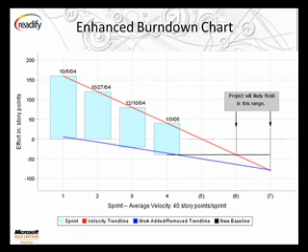In terms of managing scope, how you manage scope in a project is quite important, especially with fixed term engagements. You want to finish on a certain date and time. So what we're looking at here is basically the scope we had based in the number of points at the start of the project. We did our first iteration, we got through a certain amount of functionality. We got through 30 points or whatever it is. We didn't have any increase in scope. Next iteration we got through another chunk of work, but we had an increase. So each time there's an increase in scope, we're pushing the bottom of the bar below the line.